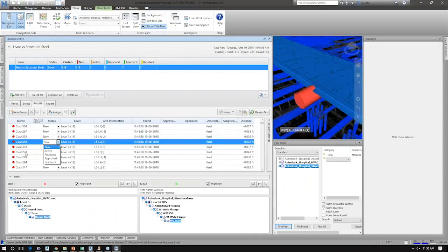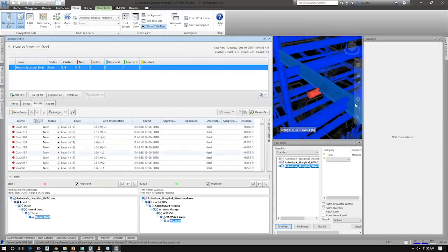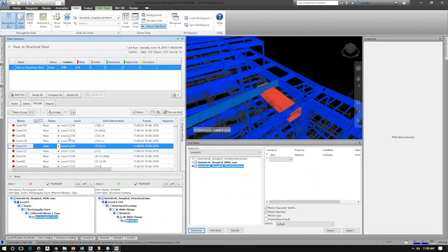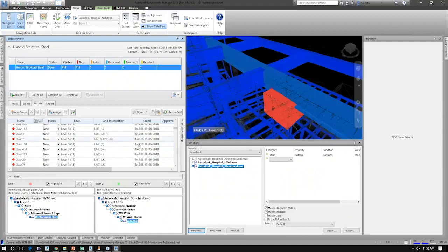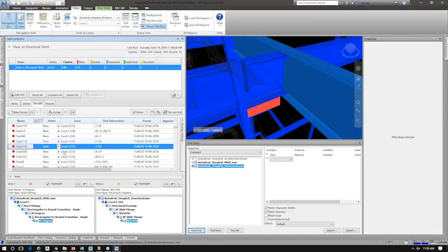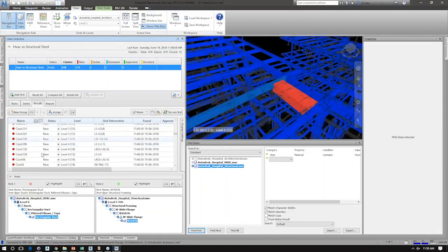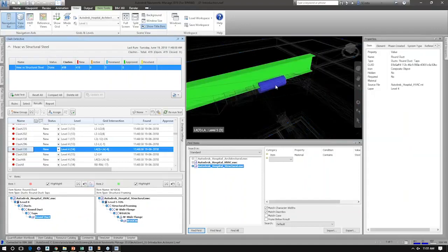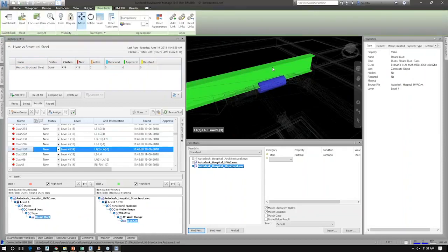So as an example of that, I'm going to go ahead and find a clash that allows me to quickly resolve it. The way you'd really resolve this in the real world is to resolve the clash by making sure that you're manipulating the actual authored geometry. So if I find just something simple like this clash here, you're going to see that I can select this round duct, and I'm going to just use some of the manipulation tools within Navisworks to move it, right? It's no longer clashing. By the way, this is not the way you would manipulate your geometry. I'm doing this as an example to show you what happens when I rerun that clash, right?